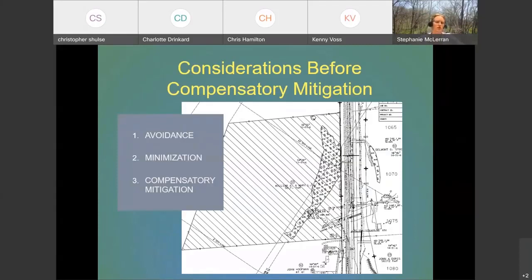There weren't records at this particular location, but it's a habitat that was suitable for it. It just was going to cost so much to mitigate that it worked out better to just avoid the feature, and the lanes were moved to the east of the existing roadway instead of to the west. And so that area was saved and eventually sold.